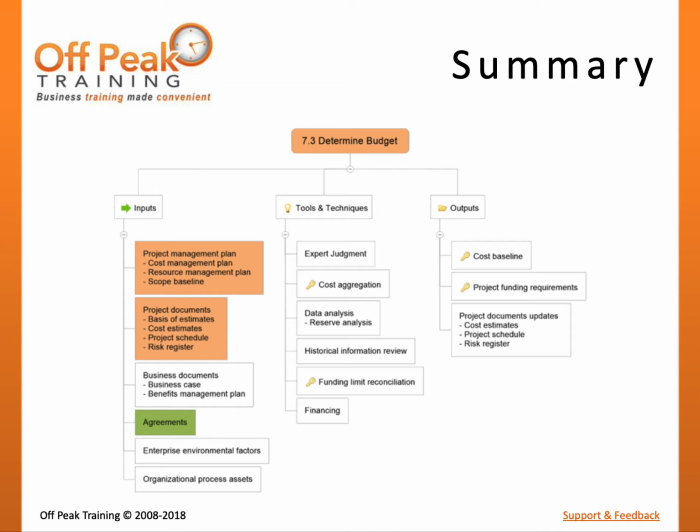It will also be used to guide the execution of project work and will provide a reference point for performance measurement during monitoring and controlling. Once established, the baseline can only be changed through formal change control.